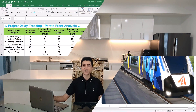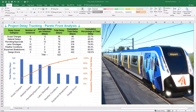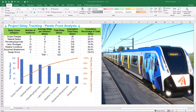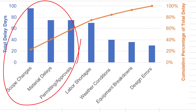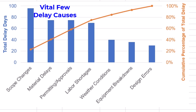Step 3 is interpretation of results and mitigating delays. First, let's focus on the columns — these represent the total delay in days for each delay cause category, ordered from tallest to shortest. The taller the column, the bigger the total delay impact of that cause. In our example, it's clear: scope changes, material delays, and permitting or approvals are towering above the rest. These are our vital few delay causes based on Pareto principles — the categories contributing most significantly to our project delays.